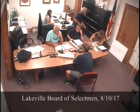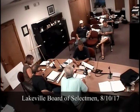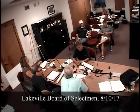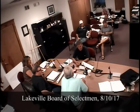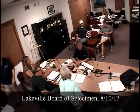How far along in the construction are you? On the road, there's about $40,000 left to finish. What do you have left to do? I have sidewalk, the subgrade's already done, top coat, and signs, just a couple little things like that. The retention pond's all done. The grass is high, on the edges. Everything's stabilized. When do you stop mowing? A couple months ago, so it's not that high.